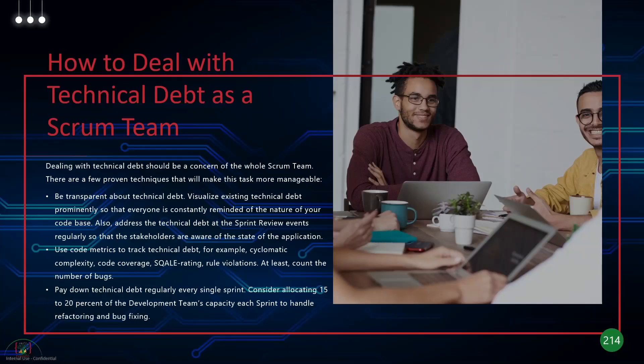As a rule of thumb, you can allocate 15 to 20% of the development team's capacity each sprint just for handling refactoring or bug fixing. If they are 100% involved in a project, take 20% of that time to work on technical debt from the product backlog, and the rest 80% can work on new stories.